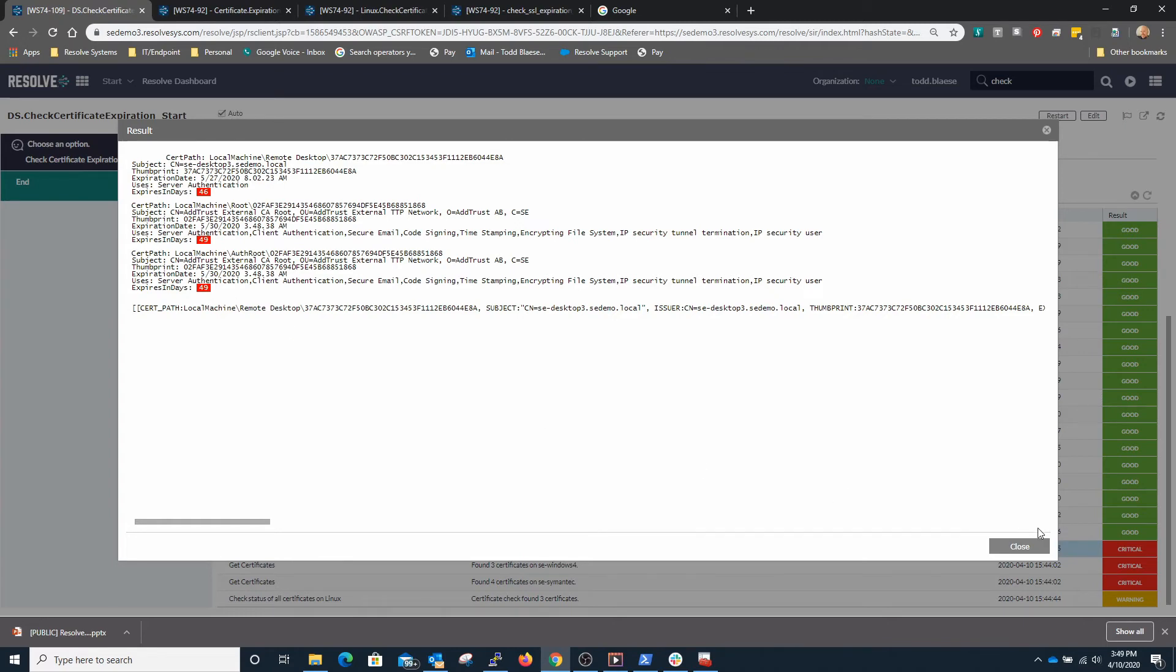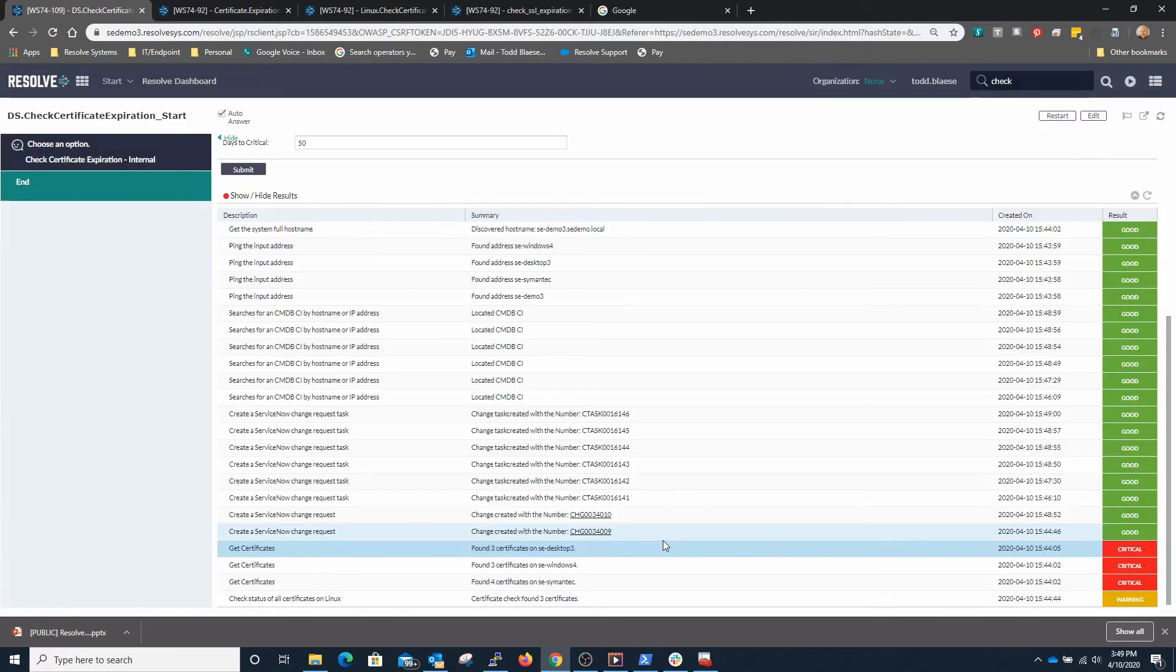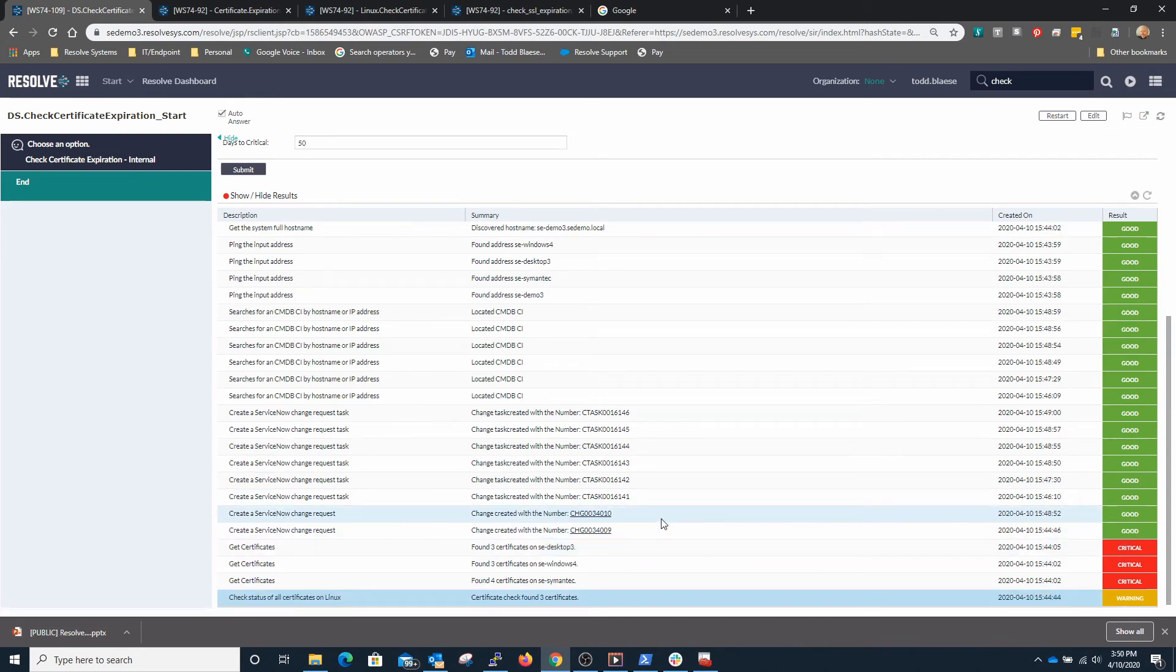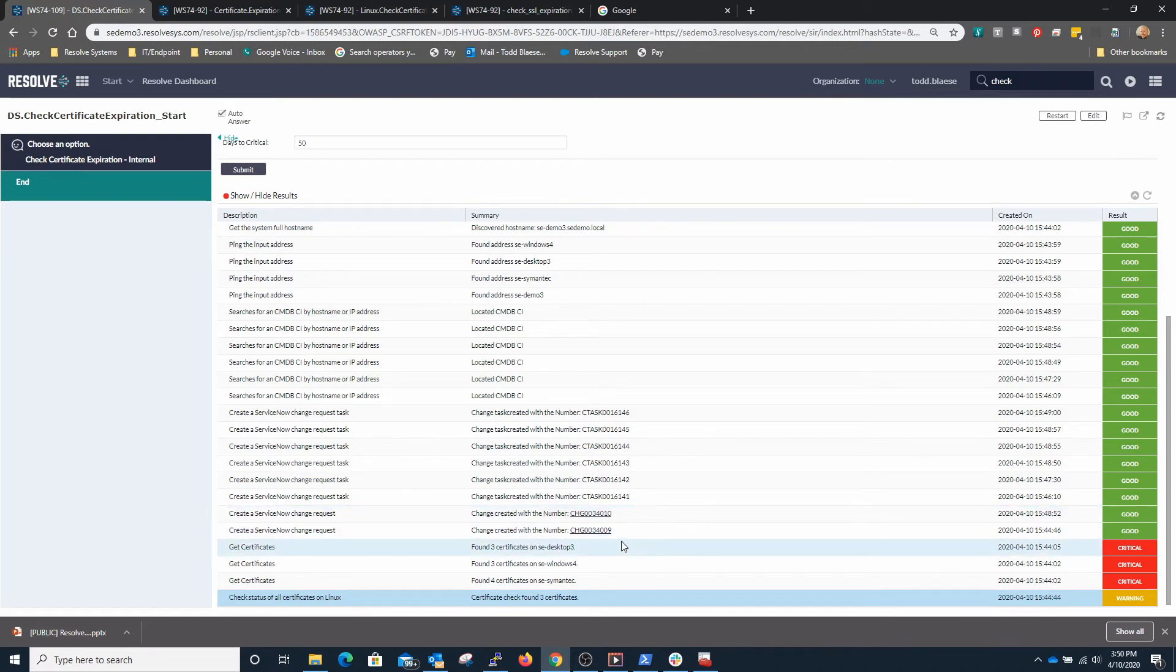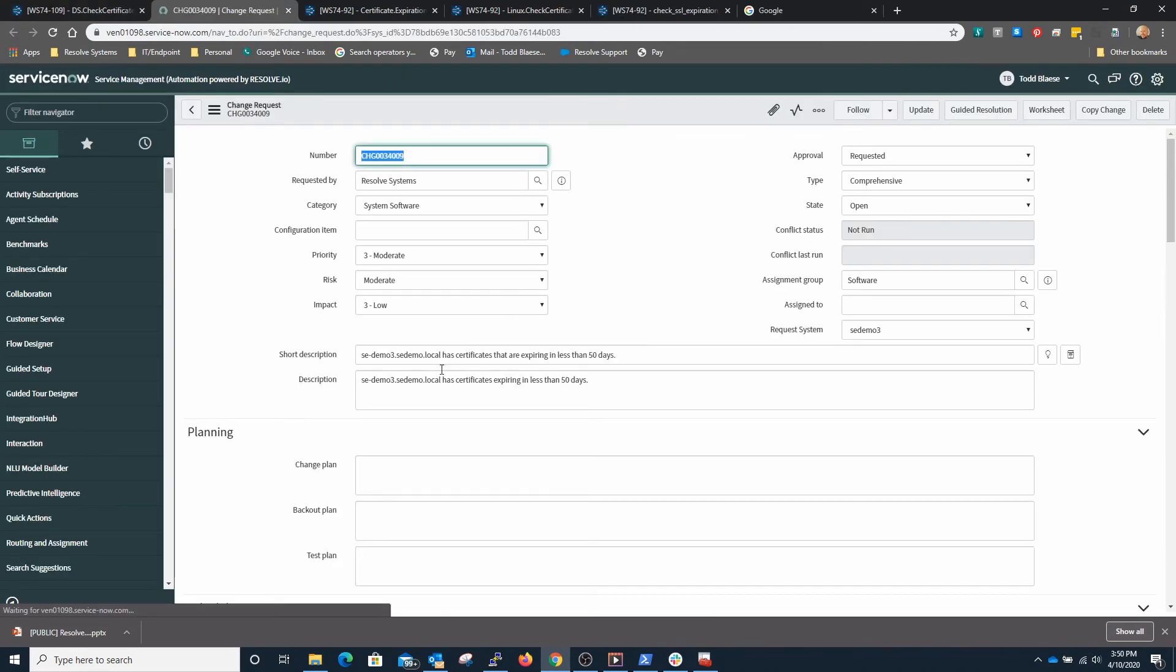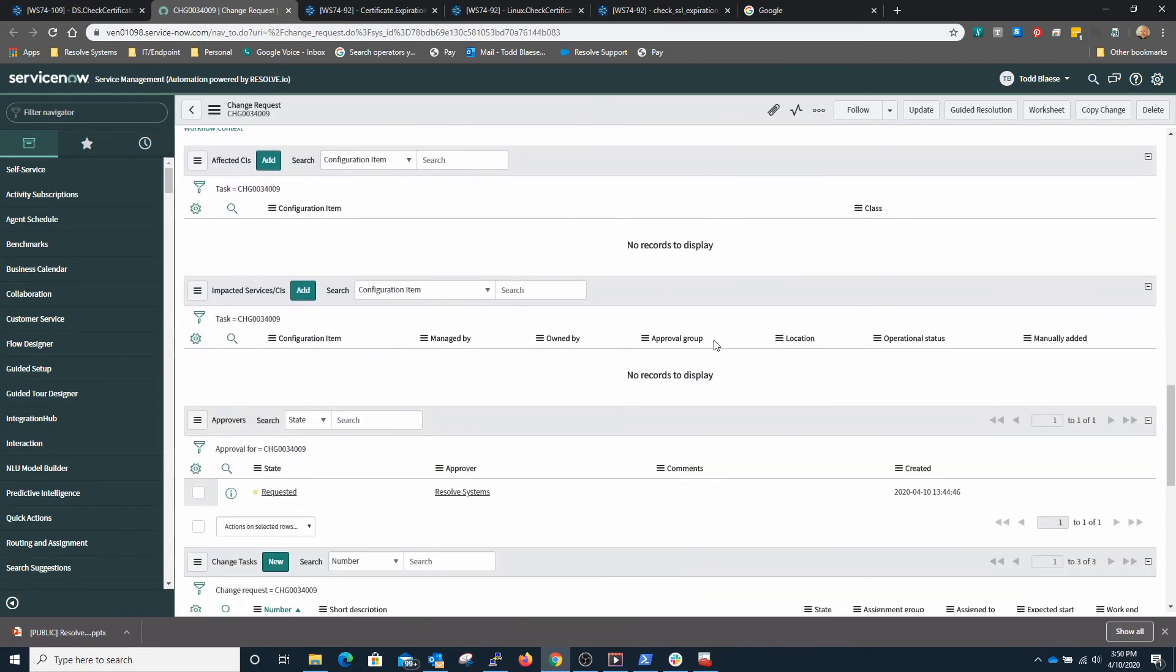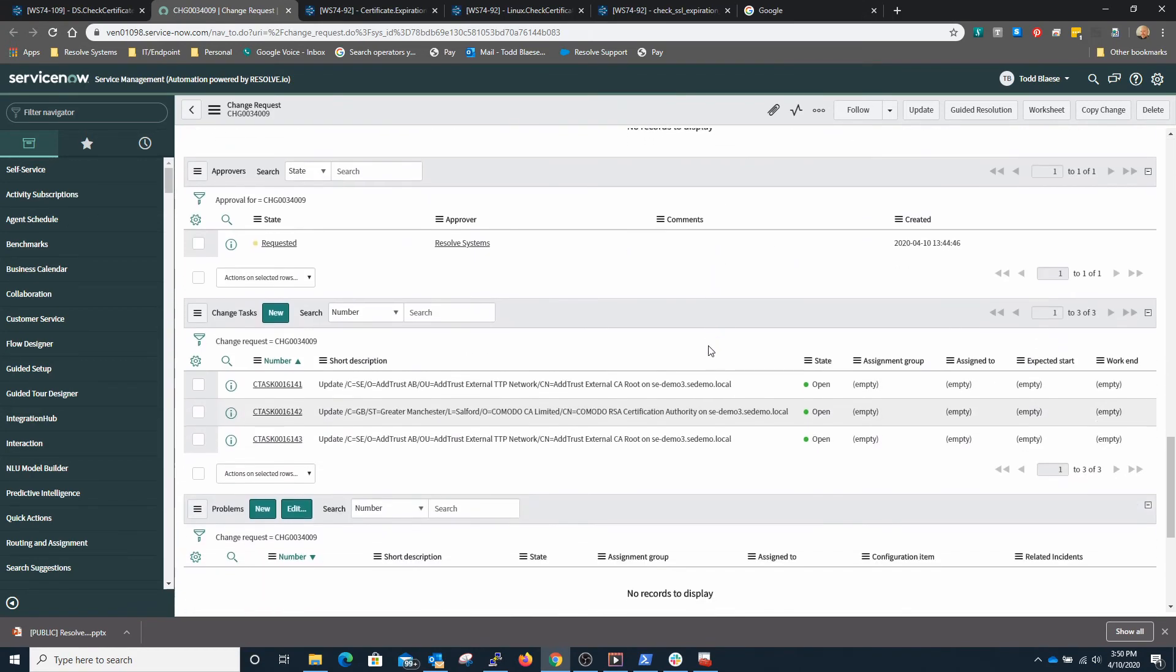And because these are critical we've automatically generated a change request for these certificates to be addressed and we've also created a second change request to address certificates that are expiring on a secondary system. If we click into the link here to ServiceNow we'll see that SE Demo 3 has certificates that are expiring in less than 50 days and we've created that change request here which is open. If we scroll down here we'll see that we've created three different change tasks for the three different certificates that are expiring and that need to be renewed.